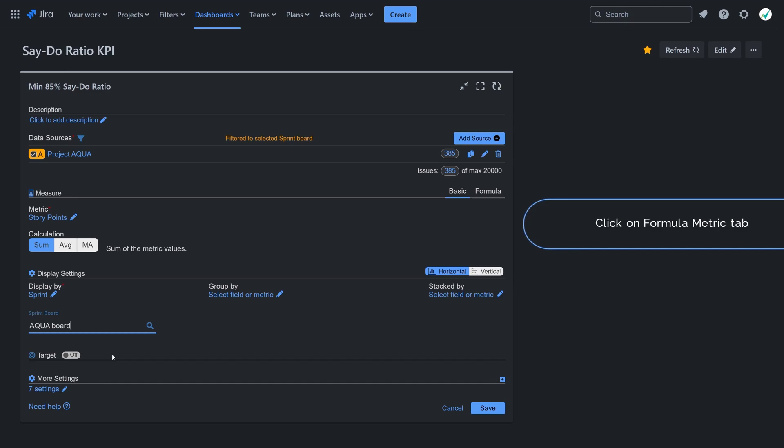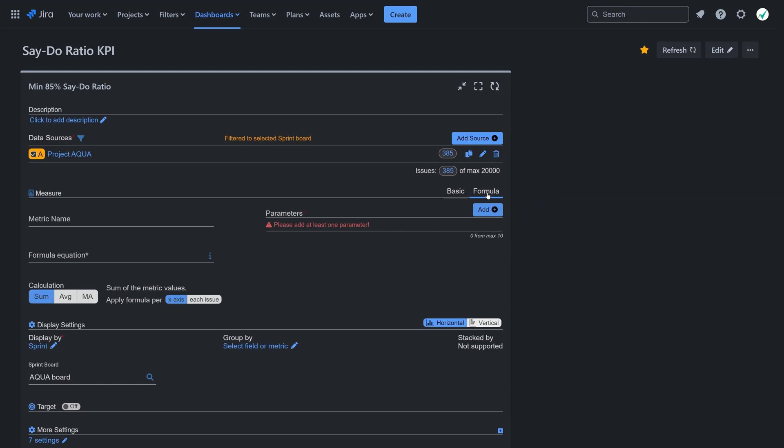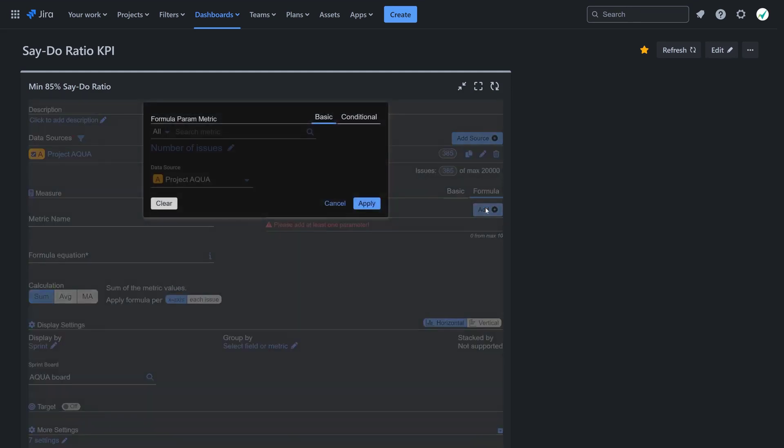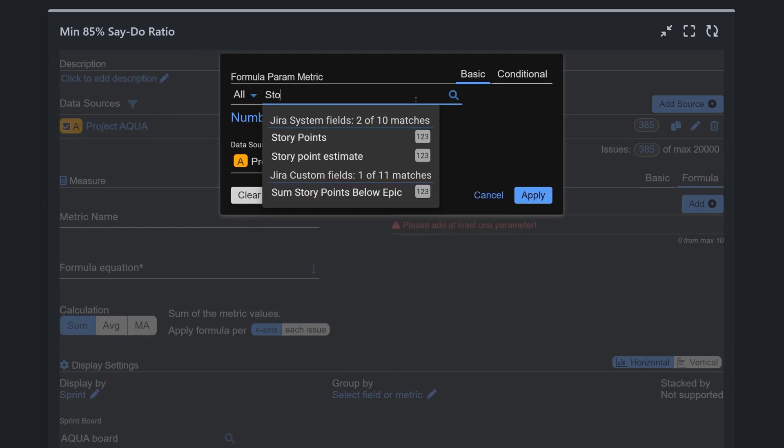Go to the formula tab. Add two parameters: one for committed and completed story points, and another for committed story points only.